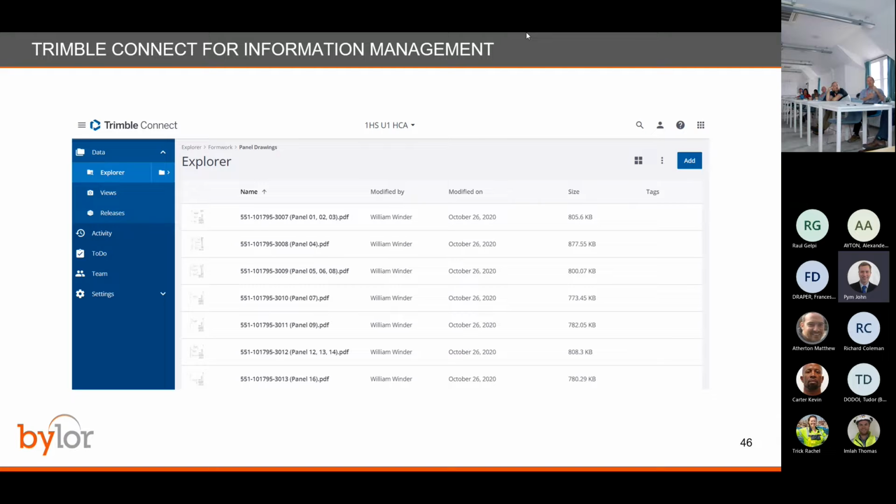You've given it out, and unless you run around site looking for that dated drawing, the information's out of your hands. The benefit of issuing all of your drawings digitally is that you can control the information at any given one time. So these are all panel drawings for our carpenters that I issued. And whenever there's a design update, you update it on a tablet. And then unless someone's trying really, really hard, they can't access outdated information, even if they want to.